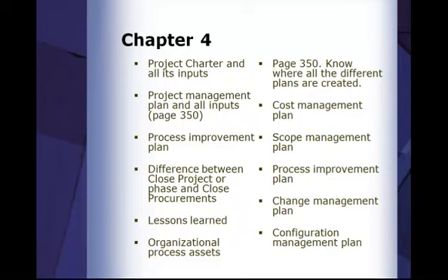Then the difference between close project or phase and close procurement. Hopefully you know that you close your procurement first and then you close your project or phase. But when you think close project or phase, don't just think about it as one term. Think about it in a practical sense. What do I do when I'm closing my project? My customer has already verified that the deliverable is good. So what on earth am I doing here?